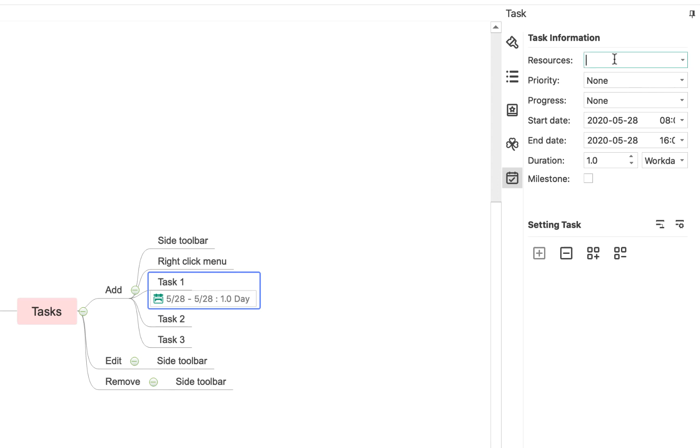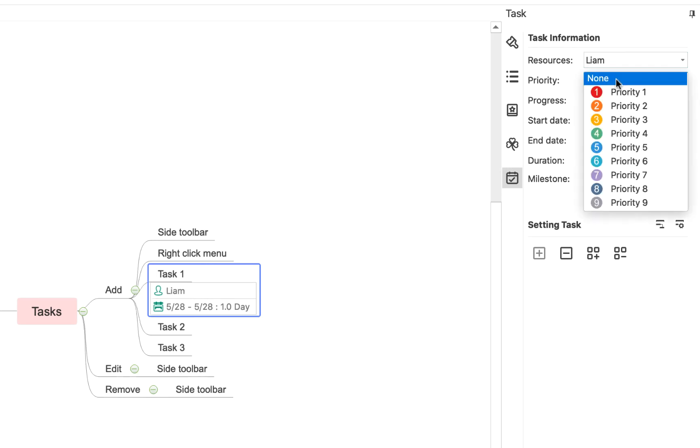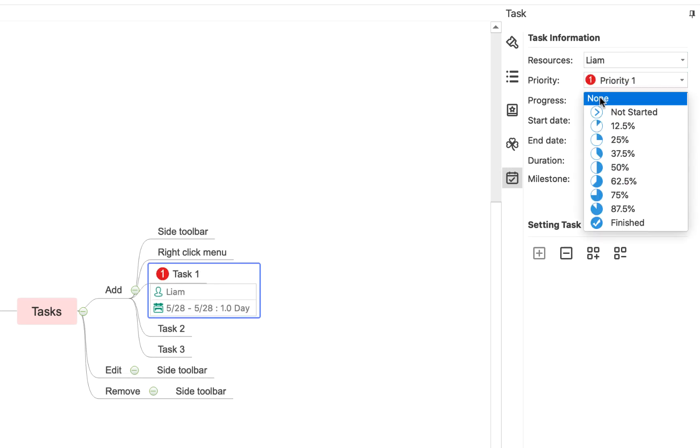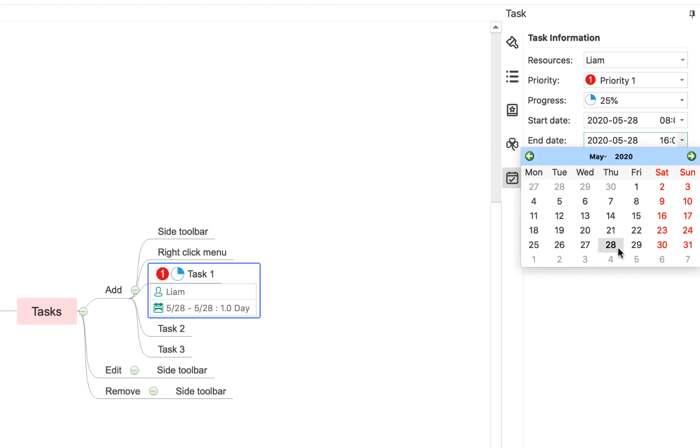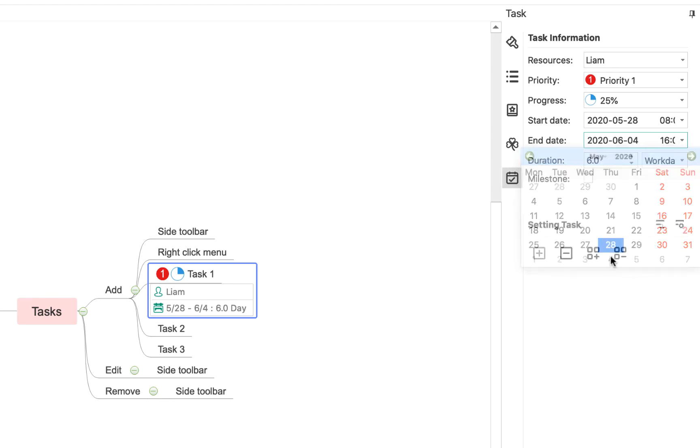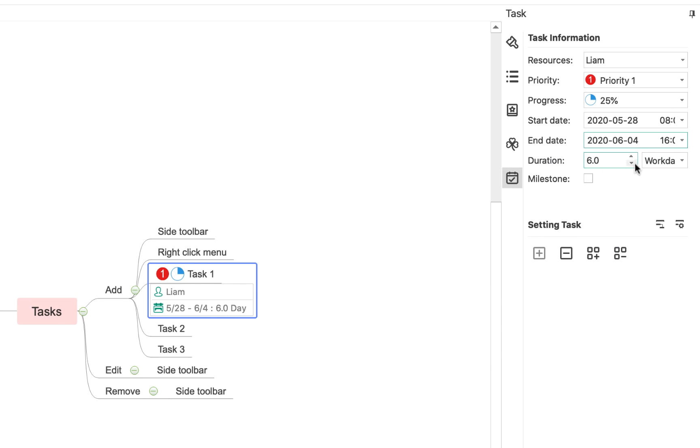So for example, I can assign resources. So we'll say Liam, the biggerplate founder, is the resource for this. It's a priority one task and it's currently 25% complete. It starts today and it's due for completion next Thursday. So it's a six day, six working day duration.